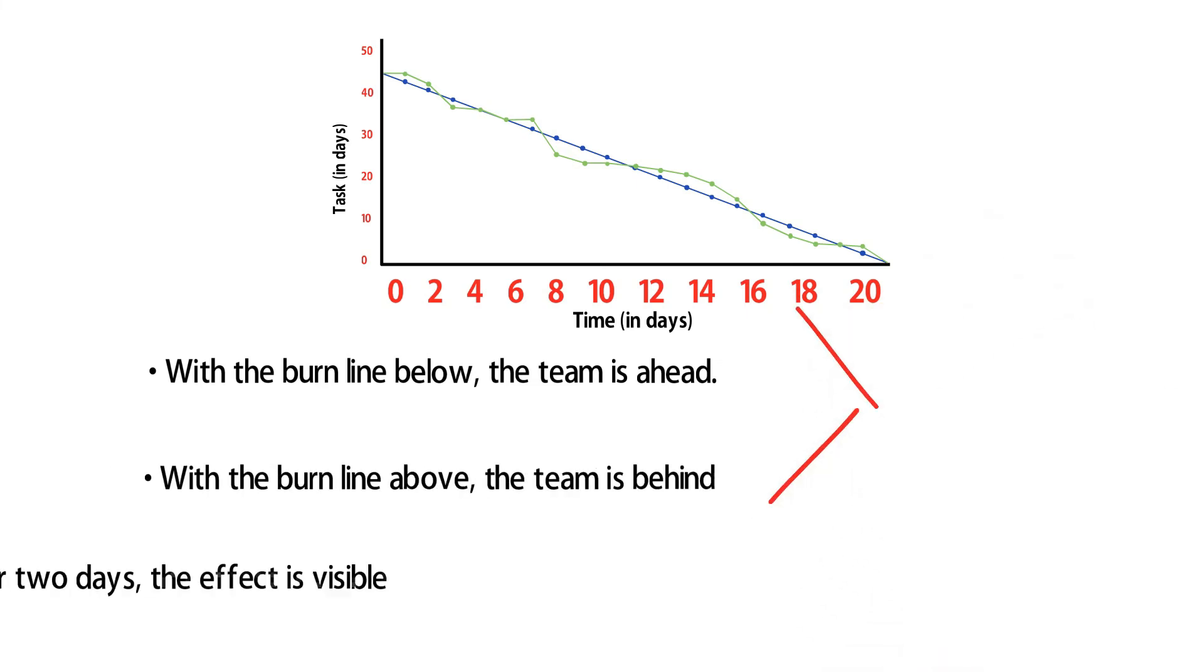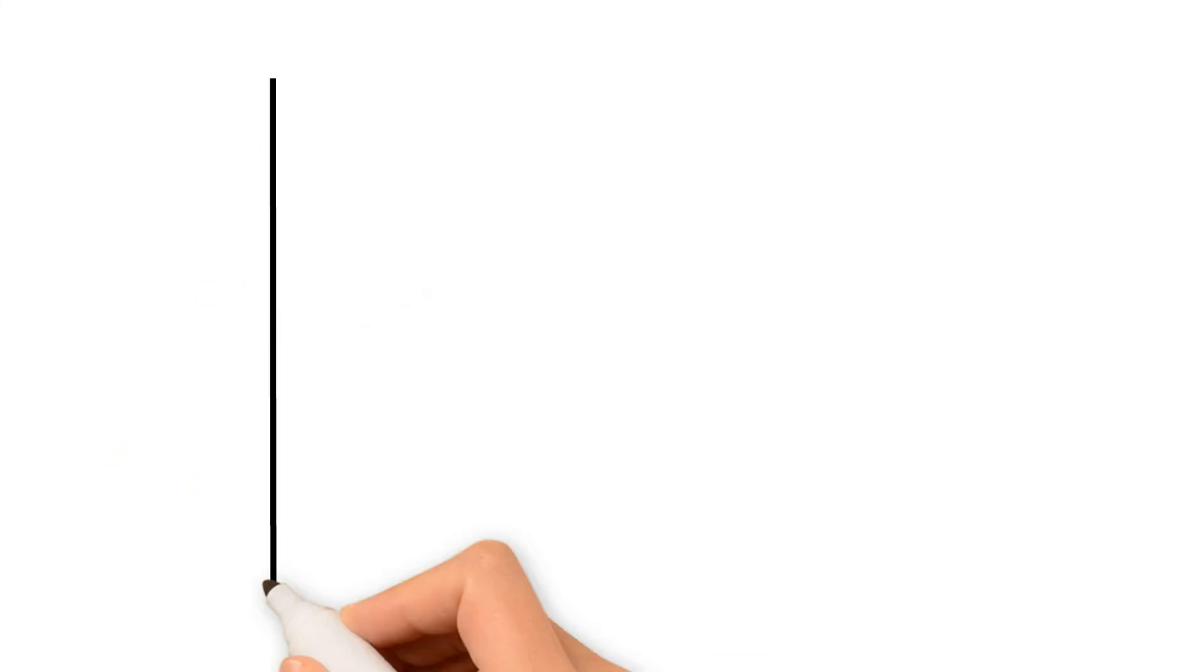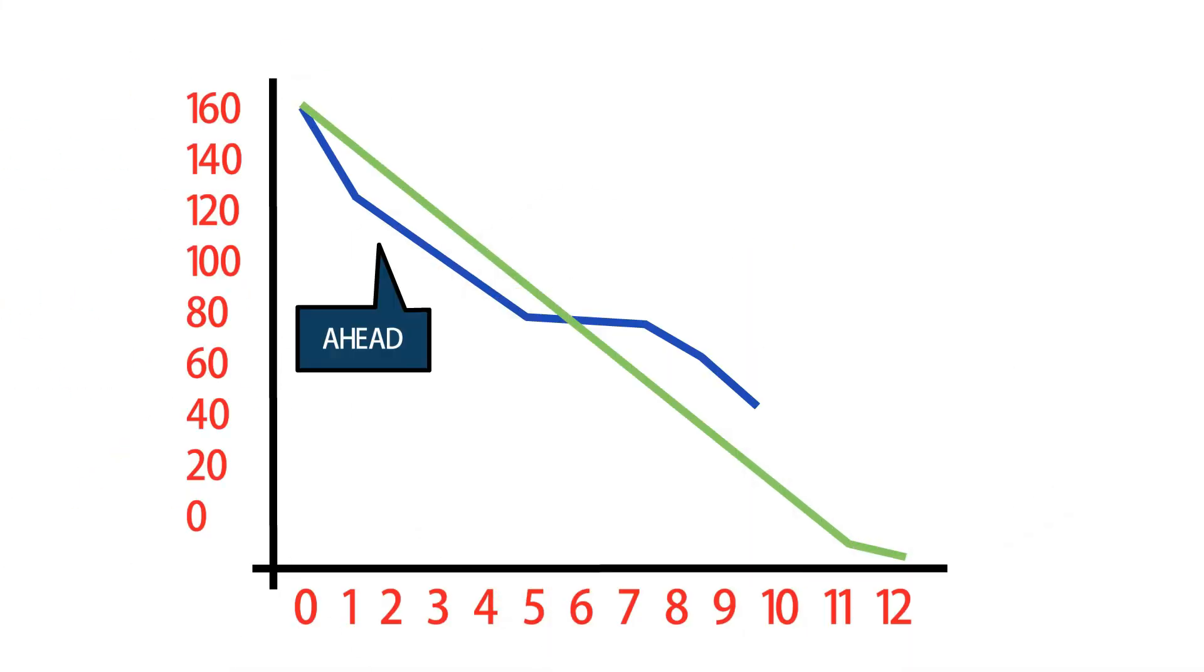With no progress after 2 days, the effect is visible. The team needs to get back on track. Either put in more effort or announce a delay in a few user stories' delivery.